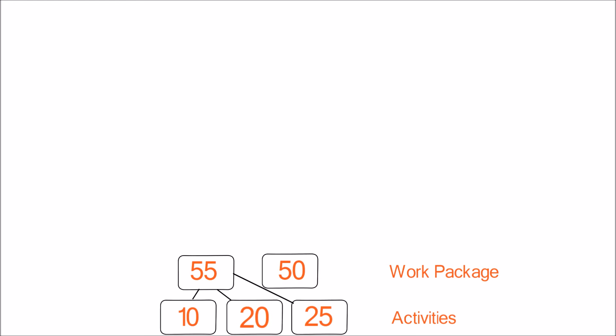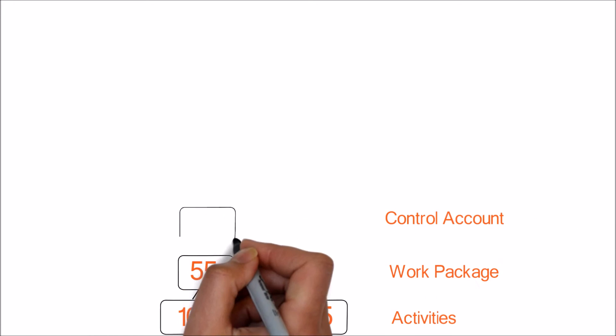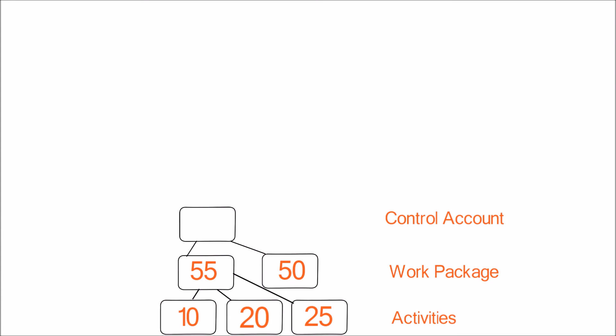50 is another work estimate of a different work package. Now let's move up one more level to control accounts. Adding the individual work packages, we can estimate this control account needs 105 days of effort.